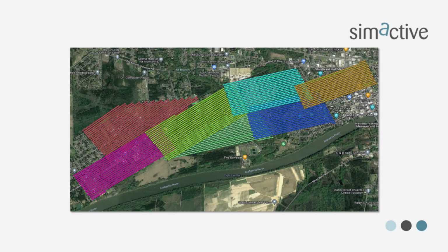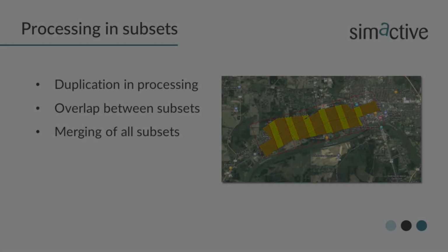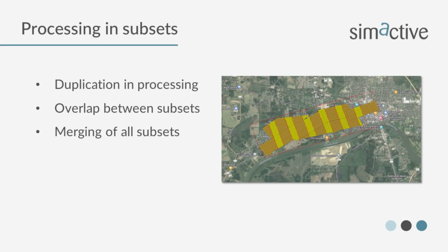Right. I think it's a very good point indeed. As you mentioned, the bigger the project, the more we notice our customers using various solutions out there have to break up the project. Typically, you have to keep some overlap between those projects that you divide, and sometimes you also have to add control in these sections. So you can imagine this adds time in the field. This adds time also on the data processing side, having to restitch segments and blocks together.